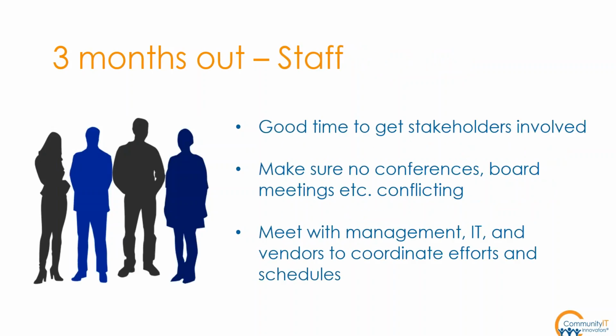So another important thing is staff. This is a good time to get the big players in your office involved. So not just the office manager and the executive director. You want all the directors, all the bigwigs in your company to be involved in this move. So make sure there's no big events coming up at the same time as the move. You want to have them meet with IT management and vendors, and you really just want to make sure everybody's on the same page and involved.